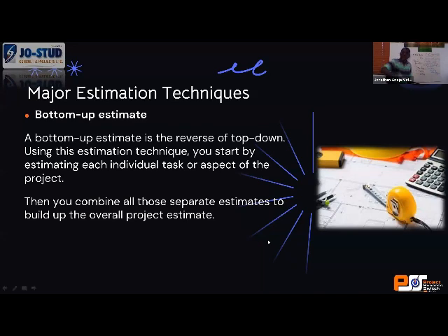So depending on how high your design is, you need, at this point, to work with your team. What is the height specified for this foundation in the drawing? If the height is 3 courses of block, you multiply 400 blocks by 3 courses. That's 1,200 pieces of block going into your foundation.